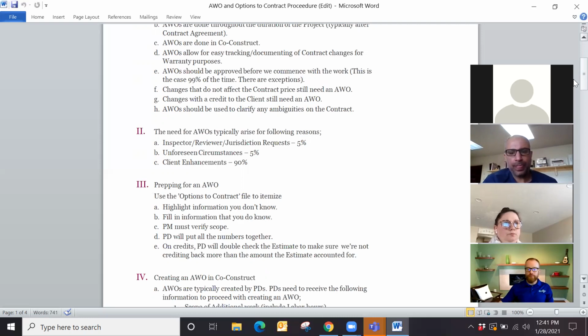In the event that that's going to cost us additional, like there's additional labor associated with doing that work and even materials, that would be a change order that we need to discuss with the client, saying, hey, the county is requesting that this is done according to code. Regardless if there's extra labor and materials, if the county's asking us to do something, in general, you touched upon it, like an additional work order is an addendum and it clarifies what we're performing. So if the county's asking us to perform something different, we at least need to get that in writing that we're doing something different, whether there's dollars attached or not. Very valid point. Any change at all, and document it.